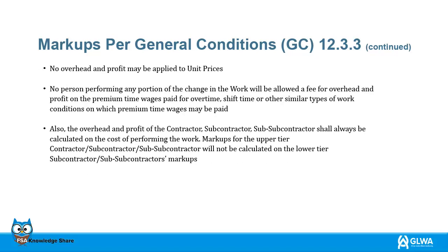No overhead and profit may be applied to unit prices. No person performing any portion of the change in the work will be allowed a fee for overhead and profit on the premium time wages paid for overtime, shift time, or other similar types of work conditions on which premium time wages may be paid.